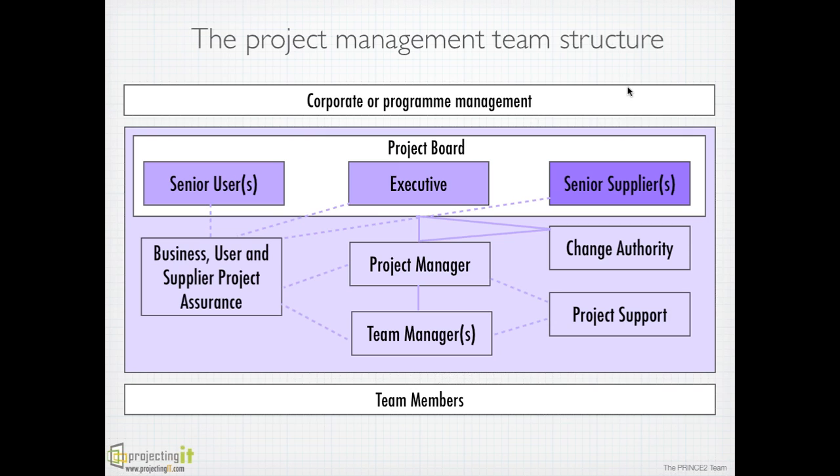The Prince2 organization theme covers the structure, the roles, responsibilities, and also how these people communicate with each other and how they communicate with the corporate and external organizations. And that's called the communication management strategy, which actually lists the names of stakeholders of the project, how they are affected by the project, their interests, and how the project is going to deal with them, what information will be sent to them, when, and by whom. That's the communication management strategy, which documents the information needs of the project stakeholders.